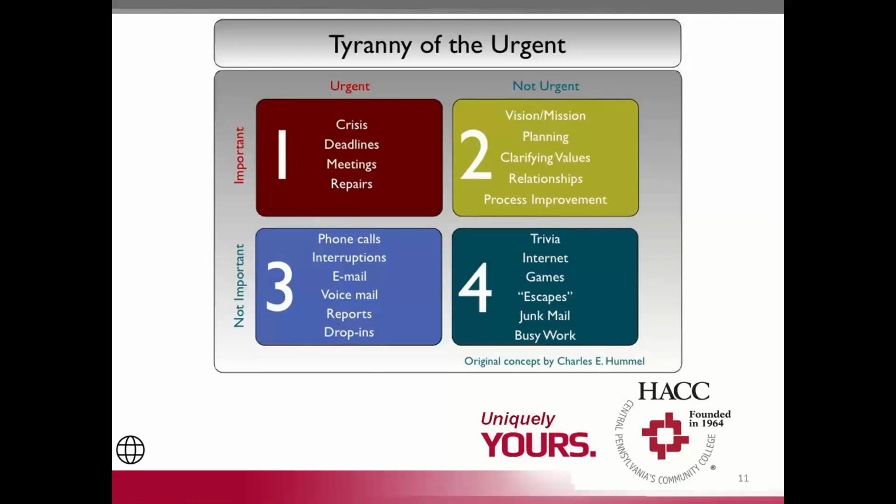One of the first things I did after we got the award and then got a contract award and did our post-award conference with the FBI was I sat down and I drafted out my program charter and my program management plan. I worked with my program executive and I worked with my project manager and my project coordinator, and then developed basically a document, a roadmap of what we were going to do.